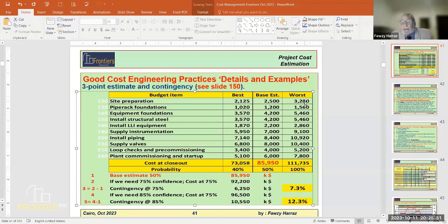It's a management decision. And if you talk about things like the schedule, if it is a big government project and we expect the prime minister or the minister or the president, then the management say, I need 100% confidence. I don't want you to give me a date and then go to the president and say, no, something's wrong, we're not ready. So the confidence level is what the management say. Tell me what maximum money you can cost. I will arrange the funding. Tell me what time you need so that on that date, you don't give me any excuse that you are not ready, because the big people will be fired.